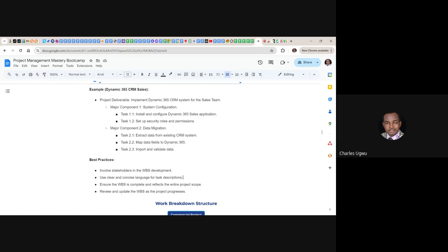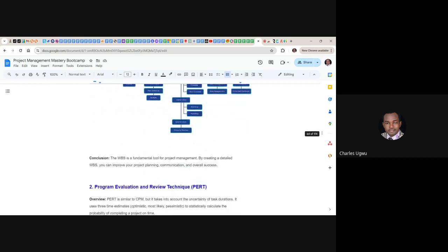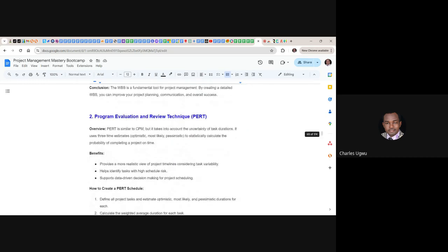Can you see there is confusion here? Because Chinenye is now saying 2 days, Anastasia is saying 4 days, and I'm saying 3 days. And this is where this part comes in. Now, looking at what we said here, Chinenye is optimistic, Anastasia is pessimistic, and mine is most likely. That is what the part does here.